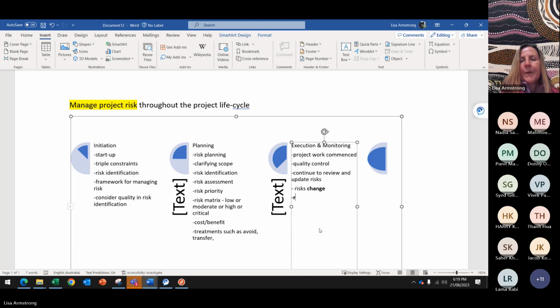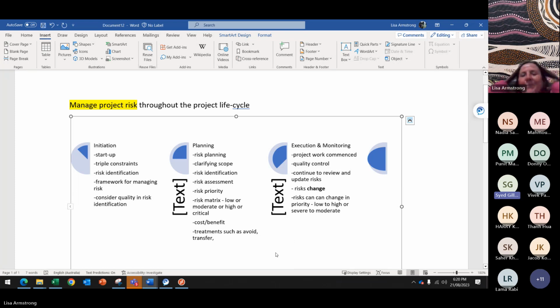For example, you are implementing a new CRM into your company, but probably in 2021 you were doing it for market competition because your market competition was so high. However, right now you're implementing exactly the same thing, but that is essentially just an upgrade. So at that time, the severity was high. Right now, it's medium, that even if you delay it, it's not much of a high risk.